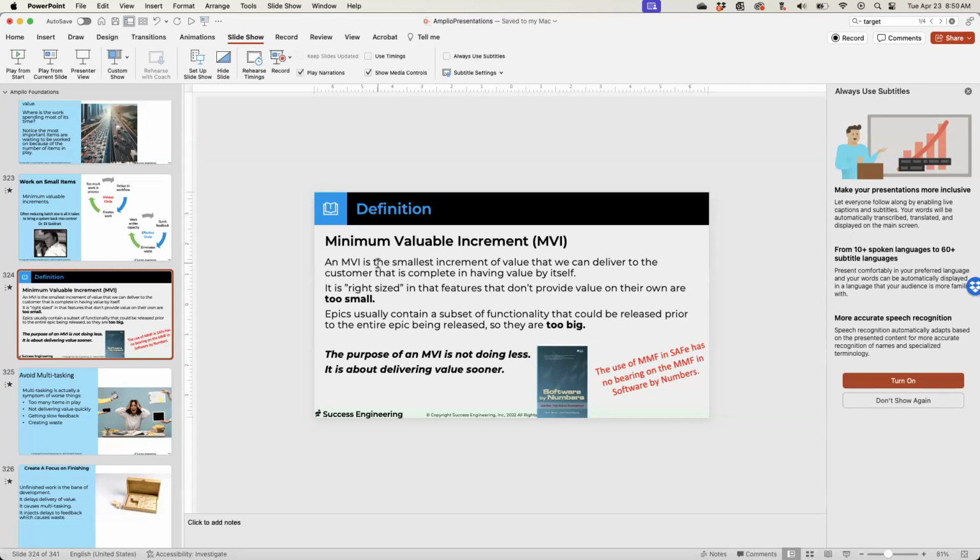So this is part of the consulting and coaching: you want to look at what they can do that's not a problem for them. Okay, so they're saying, well, I'm going to get this 4-month thing, and they're not having to change what they've asked for, and they're not having to change their expectations. But you ask them for the favor of what would be the most important things to help you build it. Then after a month goes by and you've actually built something that's of value, you can say, by the way, we've built this. We could release it now if you want, but we said we're going to build it all in 4 months and give it to you.